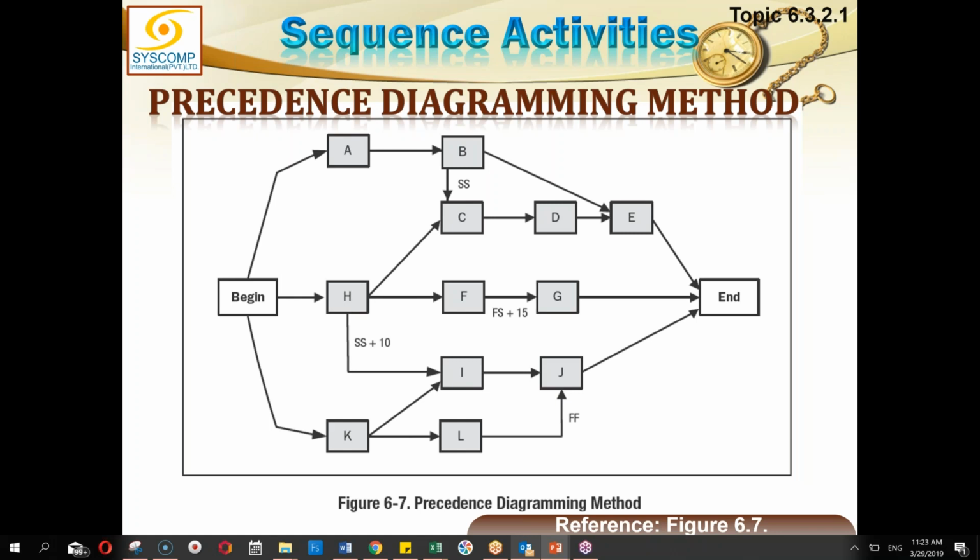But when can J start? This could be determined by another condition or it could not be there. Like here, the second relationship is I to J. So I must have finished before J can start, and L must have finished before J can finish. So J is bounded from both sides, from the start side as well as from the finish side.